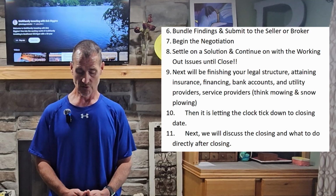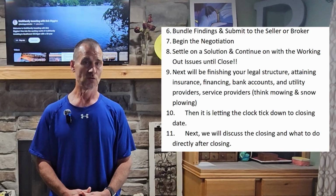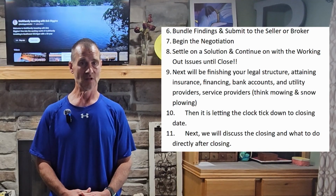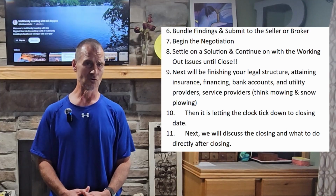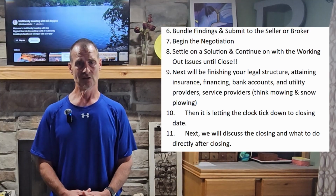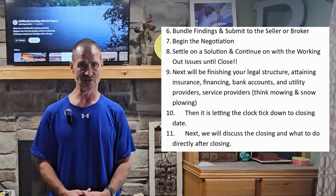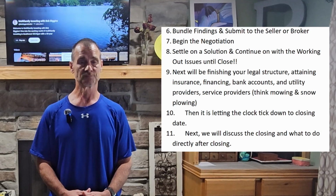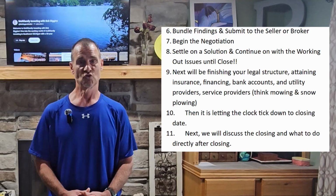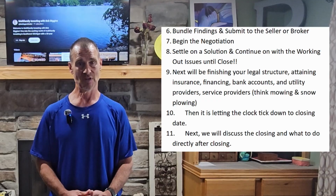Now, you can be really creative on some things. For example, say it's a large parking lot for a multifamily asset, and it's going to be $100,000 to replace the very beat up concrete with big holes, potholes, and people are turning their ankles and cars are getting flat tires. I mean, it's really bad. Six-inch potholes all over the place. Just not safe. And to redo that, you've got a quote for $100,000. A better solution may be $20,000 or $25,000 to have somebody take out all that old concrete and put blacktop in.